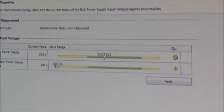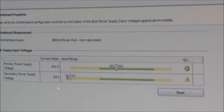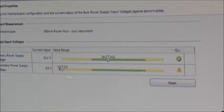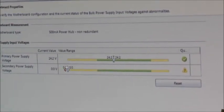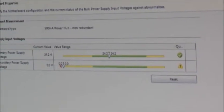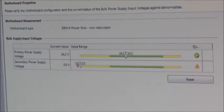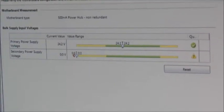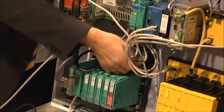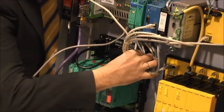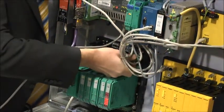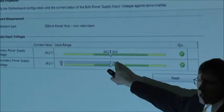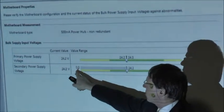Now I start the commissioning and we get a message. Primary power supply voltage, you can see here, 24V. Here secondary power supply voltage, 0. Now we have the chance to audit the plant. Now what we see here: for the guy, hey, have you correctly connected the power supply? Can you please check it? And for demonstration, I made it with mistakes. So I forgot to connect the secondary power supply.